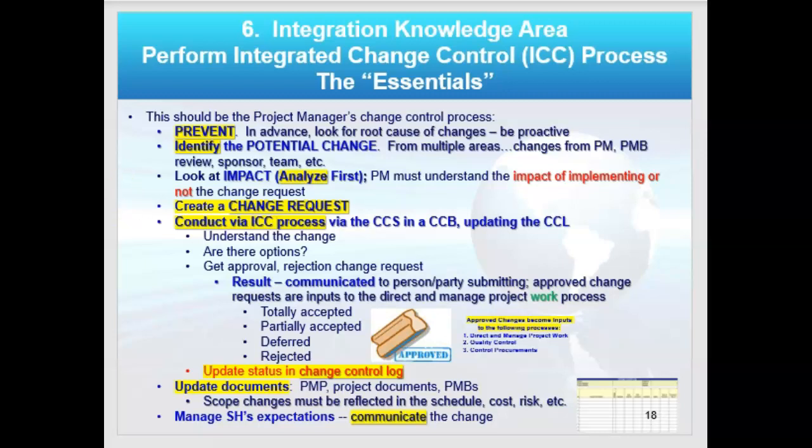Then you'll create a change request. You'll conduct the integrated change control process with its change control system and change control board. Keep updating your change control log. Whatever the results are, you will update that log. Then you will communicate it to people.